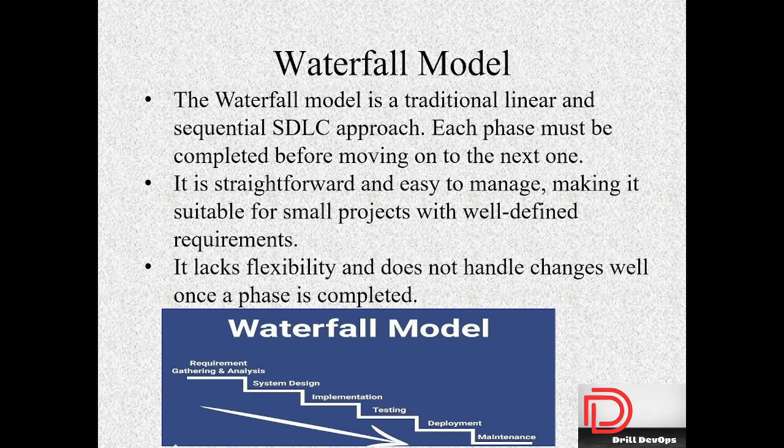If we want to implement anything in the middle, we have to go back to the first step and start implementing right from the first stage. Or else we have to wait to apply those changes until the deployment is completed, and in the maintenance window he can come and start giving the requirements, and based on that we start again.